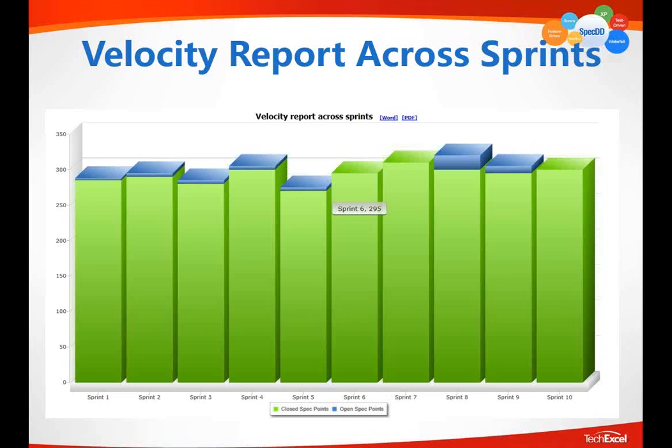Another way is to use the point to represent the size of a task, representing an average skilled person of your team, not the best, not the worst, but in the middle, taking the ideal time, meaning the focus time without playing games, browsing the internet, doing nothing but consuming the time. That's the average time, the ideal time of an average skilled person. That's the point. So as a result, you can indeed measure the productivity of the same team across multiple sprints.